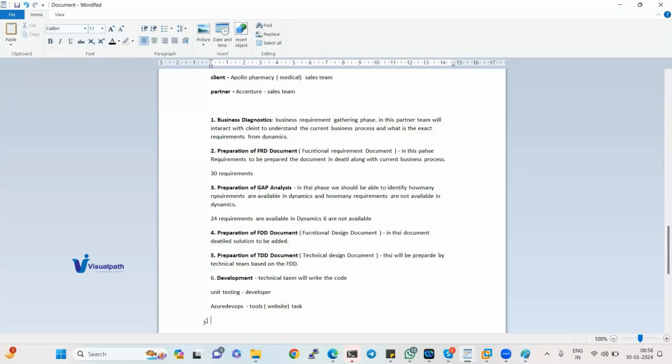So she will get an email saying that you are assigned to so and so task. Frequent updates she has to mention in the task. There is a comment section. In that section, she has to add comments on what she is working on today, where she is stuck, whether she was able to provide the solution, and whether she was able to do the development properly on time.